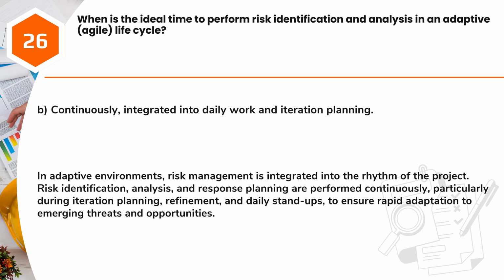Answer B. Continuously integrated into daily work and iteration planning. In adaptive environments, risk management is integrated into the rhythm of the project. Risk identification, analysis, and response planning are performed continuously, particularly during iteration planning, refinement, and daily stand-ups, to ensure rapid adaptation to emerging threats and opportunities.